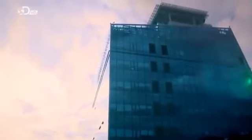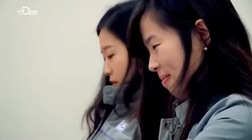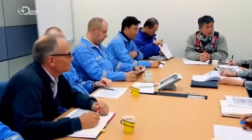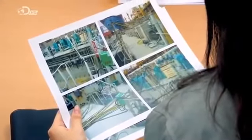Before installing the engines, Søren is keen to discuss his safety concerns with the yard. I would say your safety housekeeping is a disgrace on board 4250. You have open gratings, you have hoses, cables and everything obstructing the routes. So if you're not seeing improvement, latest by Monday, we will stop your work. Then you have a holiday. No, but we need to improve this one. It's very important. Yes, it is. Very, very. Yes. After Søren's ultimatum, the installation of the propulsion system hangs in the balance.